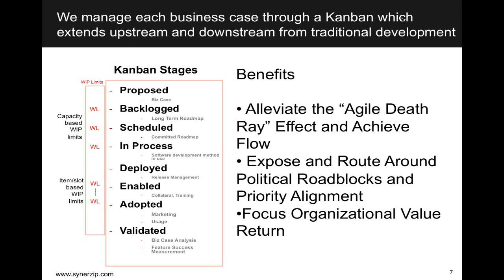Then once software is delivered, you manage it through the deployment stage, which is really marked by getting it to the point where it could go into customers' hands. In a SaaS environment, that's getting it onto production servers. In a packaged software environment, that may be getting it onto a download site or in the mail in the form of CDs to customers.